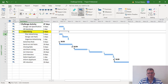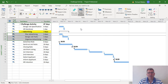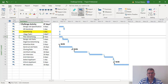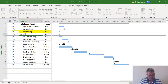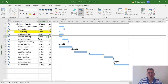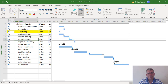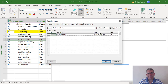I tend to be ultra safe when doing this kind of thing, so I even get rid of the summary task. I'm now going to insert a new task - right click, insert task - and that's going to be called market research, which is a four-day task. I want those two to be finish-to-start, so I'll click the chain link. I also want plan advertising and design job packs to be start-to-start, so I'll double-click on design job packs and go to predecessors to set start-to-start.